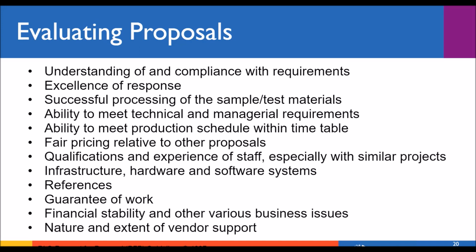So again, cost will always be a factor, but it shouldn't be the only factor when you're selecting a vendor. The research library group's requests for proposal guidelines recommend that institutions carefully establish criteria and a weighting of factors when you're evaluating proposals. This is going to help you be more objective in your assessment. The factors that they recommend evaluating proposals on are your understanding of and compliance with the RFP requirements. Did they understand it and can they do it?